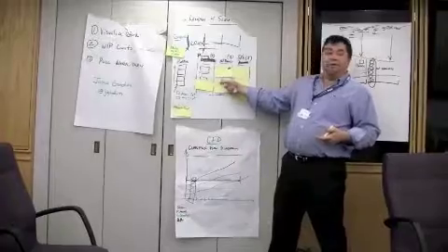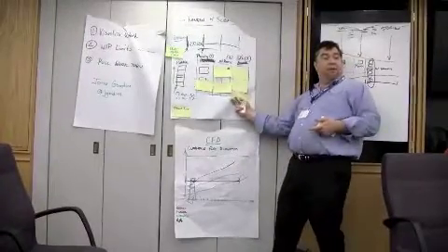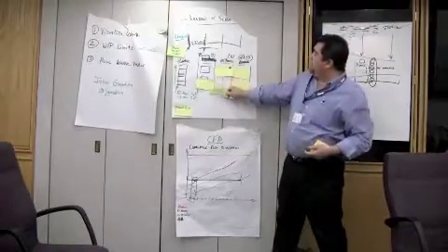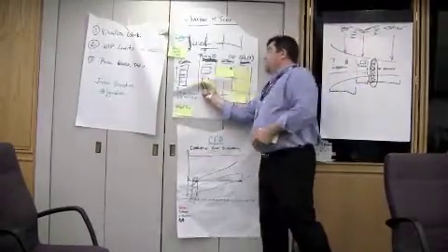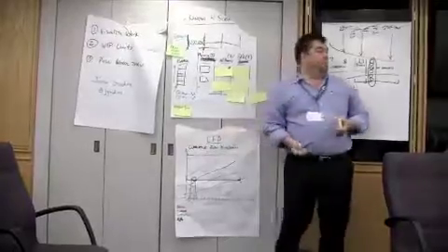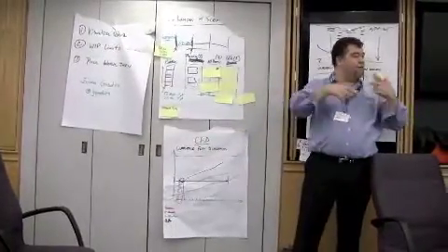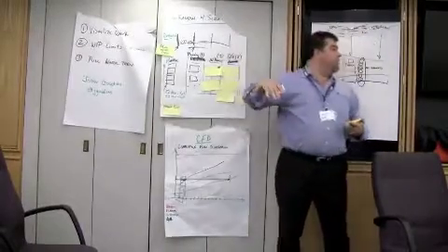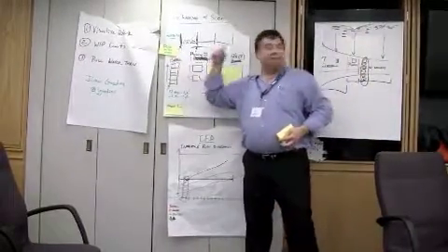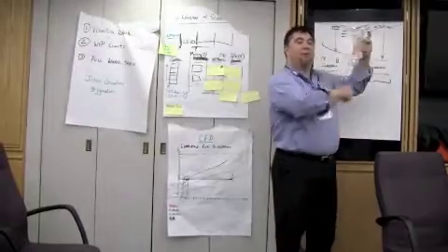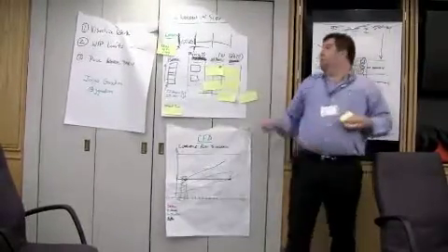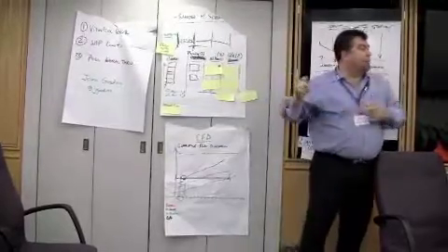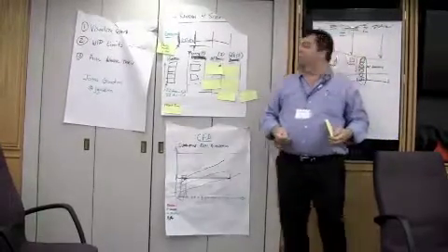In order for me to work on a new card here, I first got to go down here, help them get a card out of their lane into production or whatever, so now they can pull the next card to QA, so now I can pull the next story and start working on it. And you see how that happens as you run that system? I never, ever stack up work in any one column. New expedited requests come through the system really fast because there's no backlog for them to get through. The work's not stacking up on different people's plates. The work flows through the system as quick as possible.